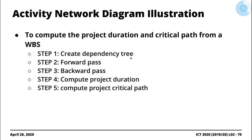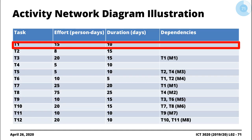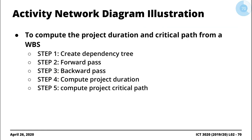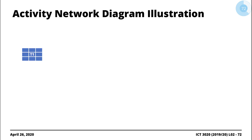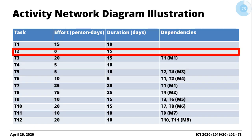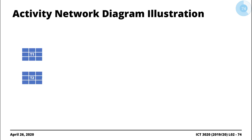We start building the dependency tree task by task. For the dependency tree, the only inputs needed are the task ID and its dependencies. Task one has no dependencies, so we write a block T1. Task two also has no dependencies, so we put the block for task two.